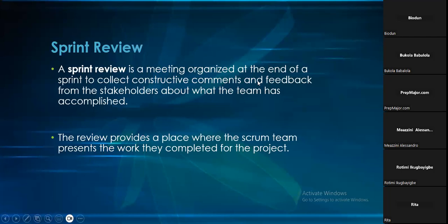Remember, the goal is to obtain feedback from those stakeholders or subject matter experts on what has been done. It's very, very important. Now, when we get that feedback, I'm trying to save time, that's why I'm not making it too interactive. I'd love to ask somebody what happens to that feedback. I'm going to refer you to empiricism, which is adaptation. One of the things you do when you get this feedback is go back and adapt. You make the changes. You go back and fix those things. You make the appropriate adjustments. That's why we do sprint review.